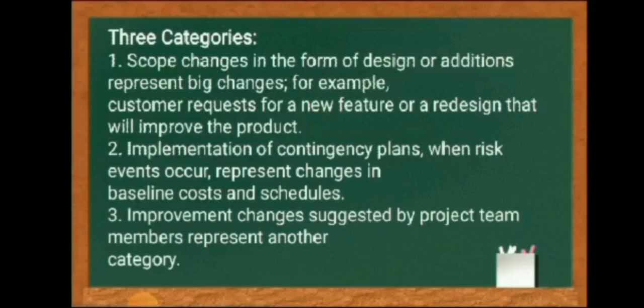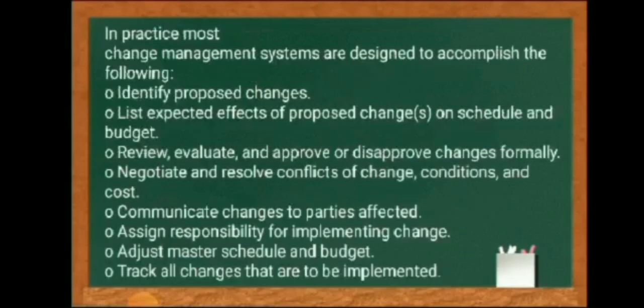Improvement changes suggested by project team members represent another category. In practice, most change management systems are designed to accomplish the following: identify proposed changes, estimate the effect of proposed changes on schedule and budget, review, evaluate, and approve or disapprove changes,